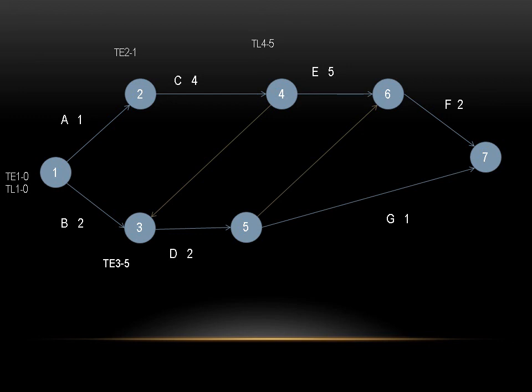It does not have any time, it has 0, but 5 plus 0, it's 5 here. At 4 it was 5 and dummy activity has 0, so 5 plus 0, 5, that is greater than 2. 1 to 3 it is 2, but 4 to 3 it was 5, so we'll write 5 here. Then at 5 it is 7, 5 plus 2 straight 7.